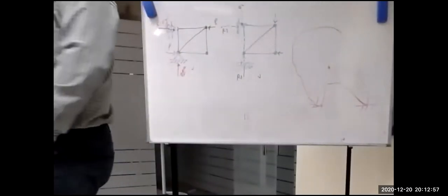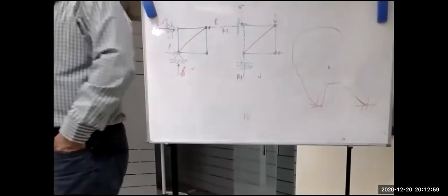Last time we claimed for only one warehouse. But for the other warehouses, because they were linked with the critical path, we got 15 days extension of time. Why? Suction to make it dry, and yes, this is a severe condition. For force majeure, it's quick.